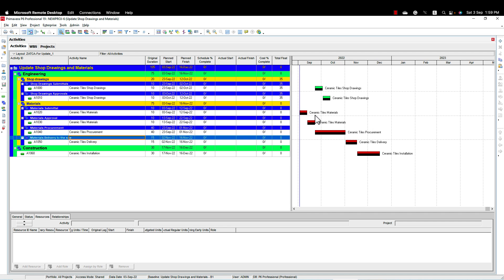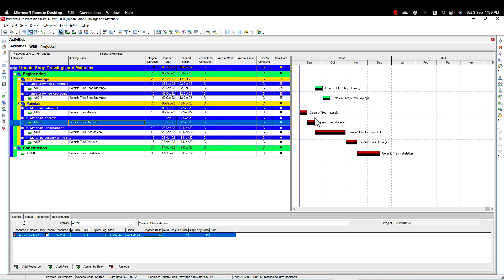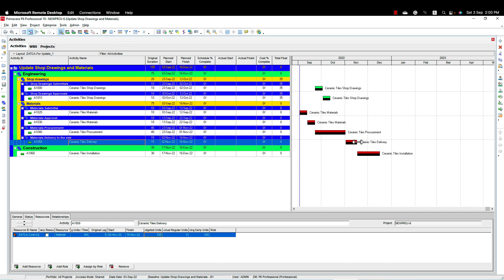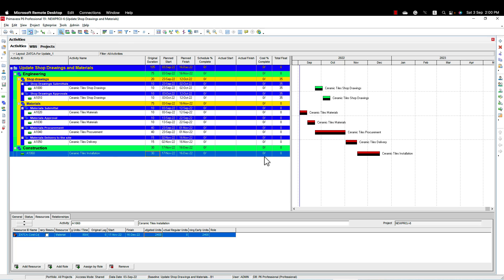For example, with ceramic tiles materials, we submit the material first, then get the approval. After we get the approval only, we can proceed and submit the shop drawings, because the size and specs of the tiles will be required while creating the shop drawings. So we need to have our material approved first, then submit the shop drawing and proceed to approval. Once we have approval of the material we can proceed with procurement, then we have a period for delivery — whether the material is coming from abroad or is local — then construction is linked to material delivery and shop drawing approval.